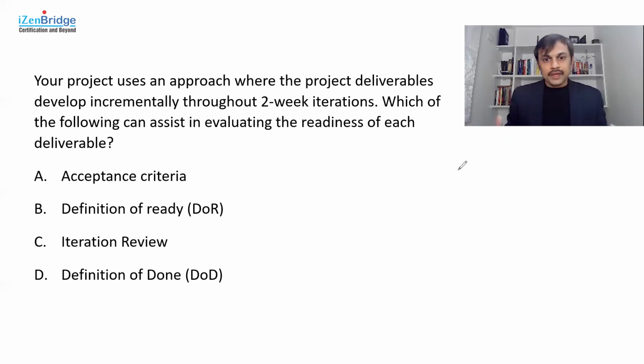Definition of ready. Now, the definition of ready has less to do with readiness of a deliverable. It has more to do with readiness of a product backlog item in order to plan it in a given iteration. So it's more like an input thing, not a completion or a finishing thing. So definition of ready is not the right option.